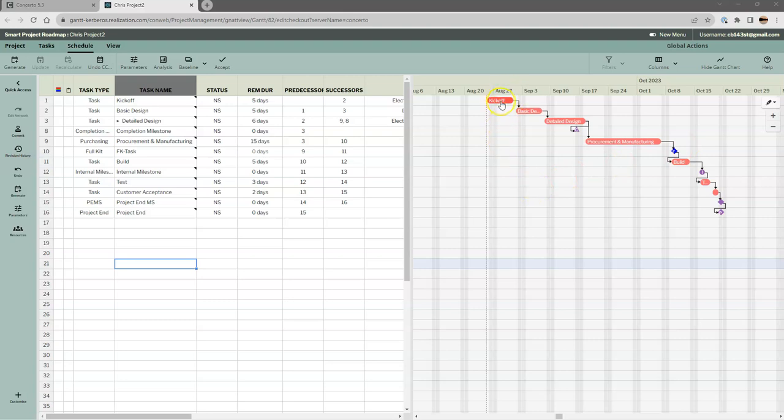So we're going to manage the project to these key dates, and then we will take these tasks that are unbuffered right now, because we're not sure how long these will take, right? 5 days, maybe it'll take 6 days, maybe it'll take 4 days. So there's some duration uncertainty for sure in almost all of our tasks.